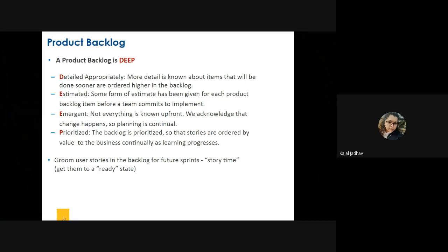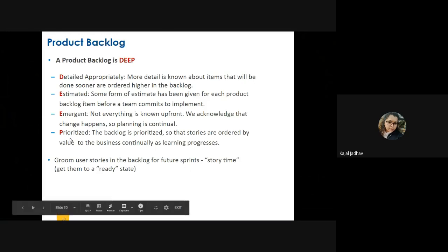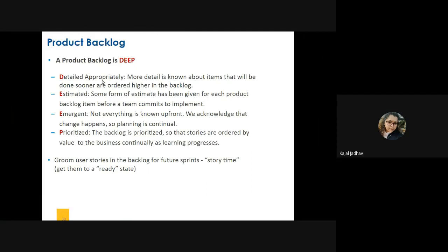They get clarity on how things are going to look, or what areas are impacted as a part of that user story. That session, when the user story is explained by the business analyst to the teams, is called a grooming session. As we mentioned, based on the complexity and effort needed in the user story, the estimation is done and the points are given. Even that happens in the grooming sessions. So these are the characteristics of the product backlog.